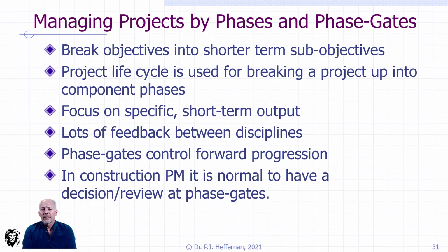So a little bit about phases and phase gates. In setting up your project, in my industry, we certainly use phases, construction phases. Certainly in construction project management, we use phase gates, and phase gates are review opportunities for us to evaluate whether the project is ready to move into the next phase and ready to be invested in for the next phase.